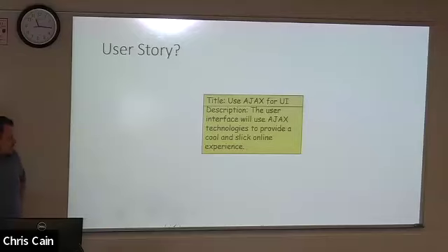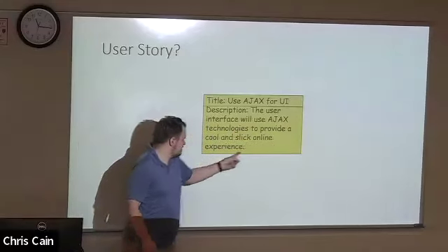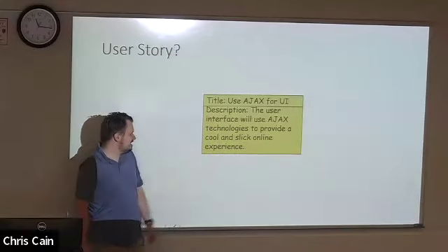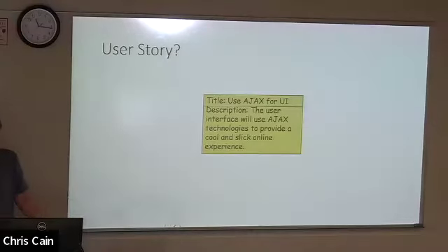The user interface will use Ajax technology to provide a cool and slick online experience. It's not client-centered. There's 2 problems. One, it's not client-centered at all. It's describing the how. It's an advertisement. And this is not concrete. A cool and slick online experience. What does that mean? Buzzword.